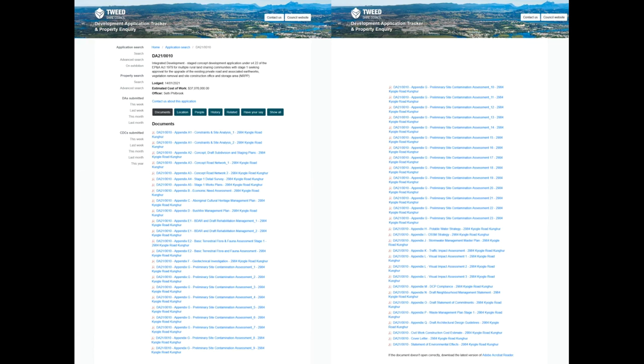So as you click through the tabs of this stage 1 development that is worth 37 million, one of these documents, the civil work construction cost estimate, tells you what the estimate is. There's a 37 million dollar cost to what they intend to do or cover, and there's a 15 percent contingency which bumps it up to 44 million. I said last time it was GST, but it was actually the 15 percent contingency that bumps it up to 44, and then GST is applicable where applicable on that.